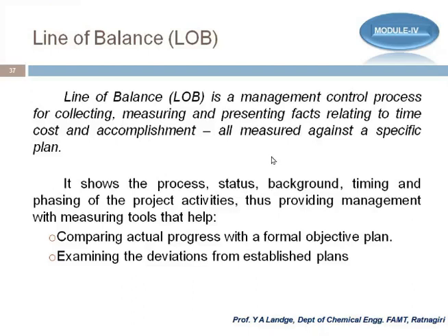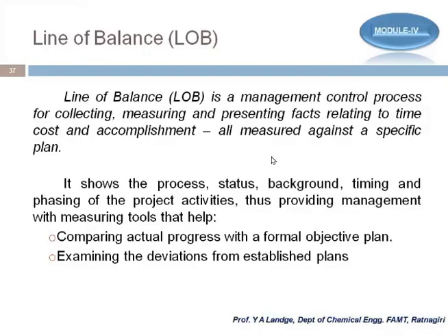Because if you only find out at the last moment, say, for example, that activity A requires 4 weeks, and up to 3 weeks only 20% of the work is done, now you have only 1 week and you have to complete the remaining 80% of the work. Is it possible to complete? Definitely not, because there is a lot of burden in the last week.